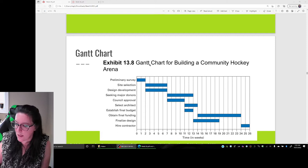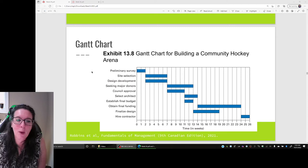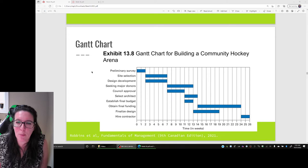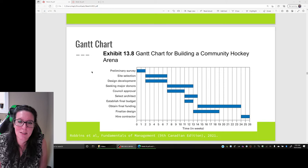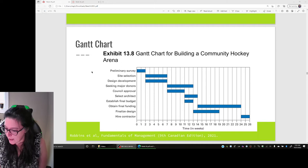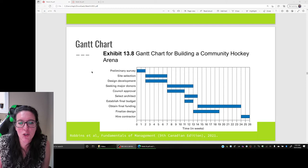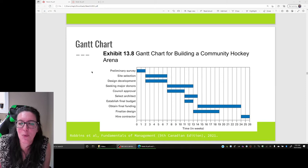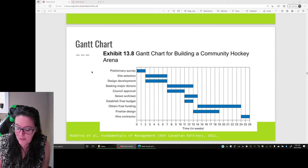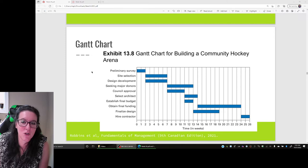This is what a Gantt chart looks like. We have our activities here, and this example looks at building a hockey arena. The bars across time show that first we need to do a preliminary survey, which takes two weeks. Then we can do site selection and design development, and those can happen at the same time, from week two to week seven. A Gantt chart shows the activities and how long something is going to take, as well as the order of the process — preliminary surveys come first, hiring the contractor comes at the end.